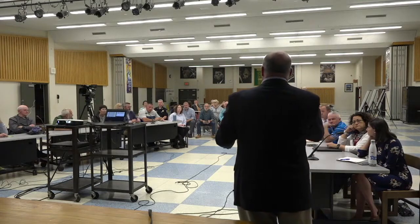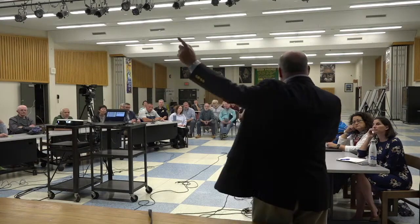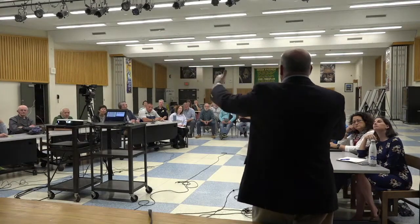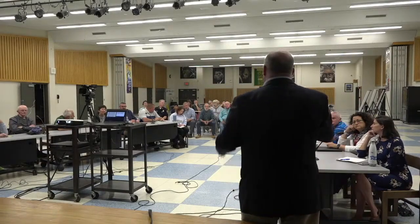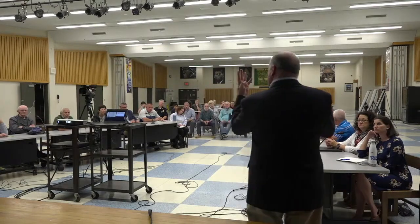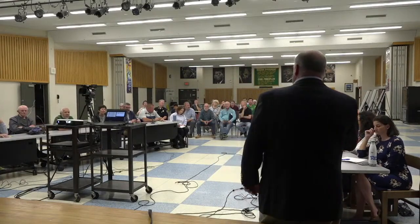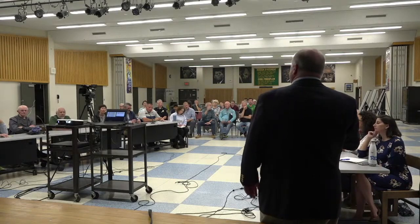Yeah, where did the 70% go? So you're at 70% on reimbursable square footage that then is subject to the cap. So the cap does come into play. So it was never 70%. I'm sorry? It was never 70%. It's 70% of eligible costs, yeah. Right? So it's never going to be. Yeah. It's probably more like something in the 40s. Yep, it is. And hopefully not high 30s, to be honest.